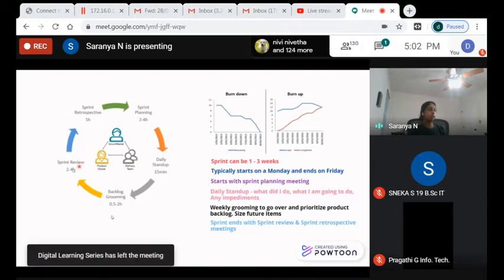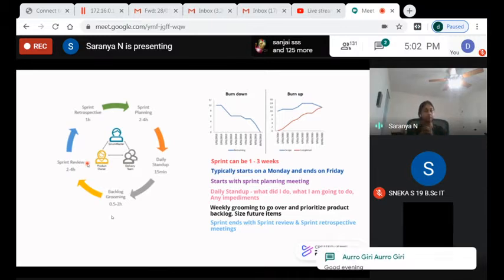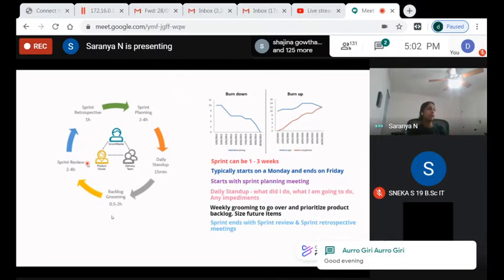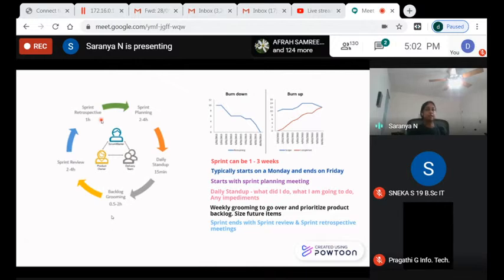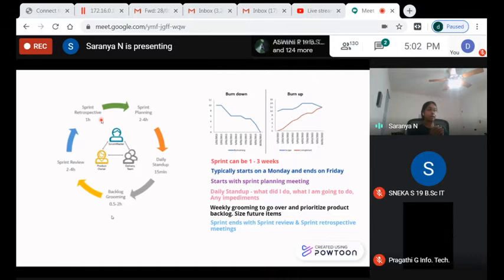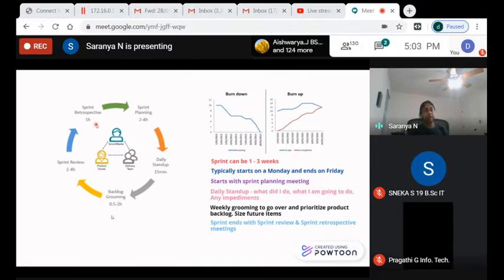At the final day of the third week, we do a sprint review — we show all the work we completed to other departments or customers. Then we have a sprint retrospective: what should we have done differently, was there good team coordination, what pain points can we address? Nothing good comes out of people just doing their own thing without collaborating, so the retrospective gives us a chance to open up and talk about concerns from the sprint.